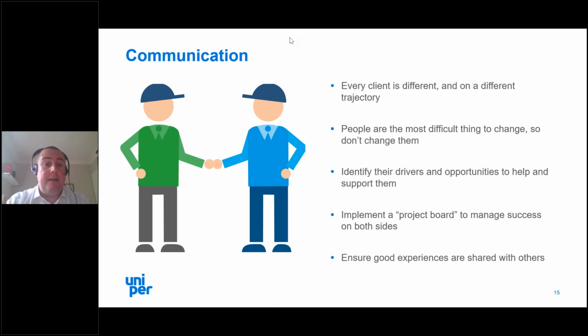And then once you've done that, it's great to identify all these areas, but the key is to keep yourself honest with it. So what we do on every implementation of our analytics system is implement a project board with senior stakeholders. We employ a project manager or a commercial project manager, a senior technical specialist, and a senior commercial contact, usually the head person for the region. Monthly they will meet, electronically nowadays, with similar people from the customer's business, and we'll track progress throughout the process.